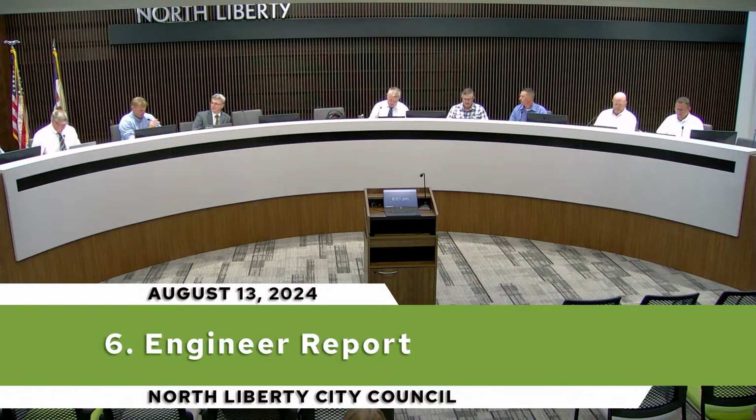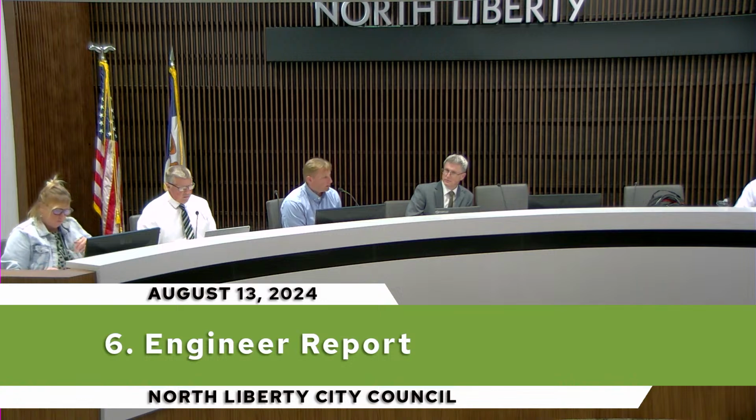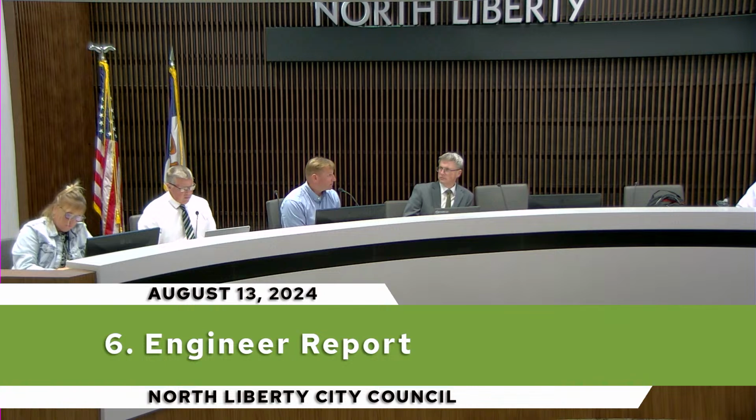Josiah. Thanks, Mayor. A couple updates on design phase projects going on right now. One is North Liberty Road Trail Project. We've had some discussion about this in the council here the last few months. We prepared a new trail design across the property there on North Liberty Road to avoid the property and easements. It does require adding curb and gutter to the street to move that trail in and keep that separation from the trail and the street, adding storm sewer. Some grading and things like that.